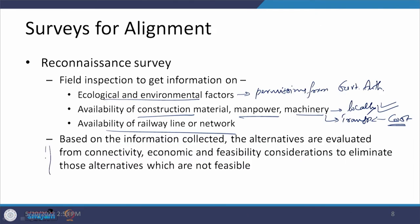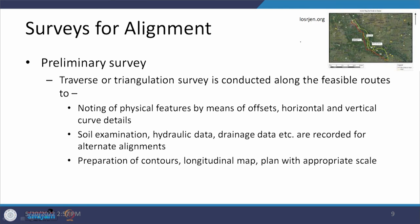That decision needs to consider not only the A-to-B connectivity but also obligatory and non-obligatory points, and the economics of construction, operation, and maintenance. Once feasibility is assessed and eliminations are made, we are left with only those alternatives that can be taken forward. With 1, 2, or 3 alternatives remaining — as shown in yellow or red here — the next thing is to collect more detailed information along these alignments, and that is where the preliminary survey comes into picture.